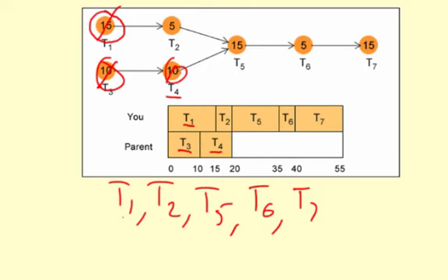Cross that out. The next one coming up on the critical path is task 2 because that is the longest path now, and that will start after task 1 finishes. And then you can see the rest of the critical path, task 5, 6, and 7, those all have to happen in order. So it turns out this schedule actually already matches the critical path scheduling algorithm,